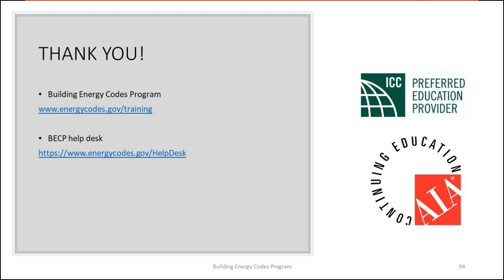All right, on to commissioning. There was a question whether the study I cited was available. Yes, if you just search the name Mills, M-I-L-L-S, commissioning, and LBL, you will find many studies by Mr. Mills over the years that built on each other. If you look at the slides, the full title of the study is in there as well. There was a question about simple buildings and a 50,000 square foot cutoff. To clarify, the simple HVAC process is limited at 25,000 square feet, so anything over 25,000 square feet will fall into commissioning. The reason I laid it out that way is that the CBECS data about how many buildings are in which category has a break off at 50,000, just so we can see what that was. Early on, we considered whether to limit design commissioning to above 50,000, but we ended up making the same cut that we did for general commissioning.